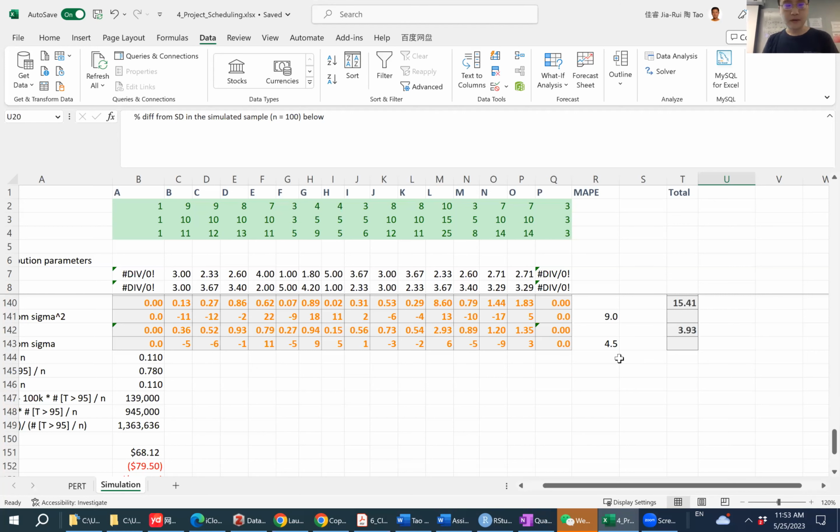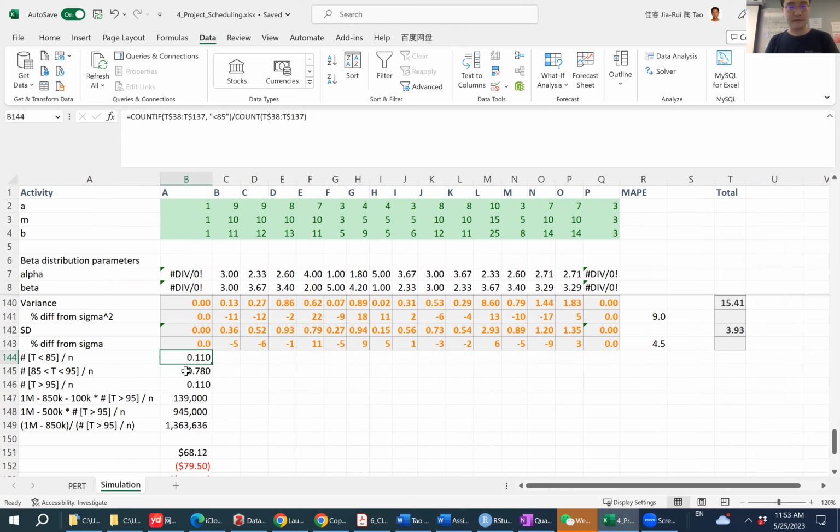This turned out to be not so complicated. For most of you, I consider that this might be much easier to understand than using a normal distribution to derive probability. Using a simulation where I created 100 cases, the way to calculate probability is just a ratio or fraction.